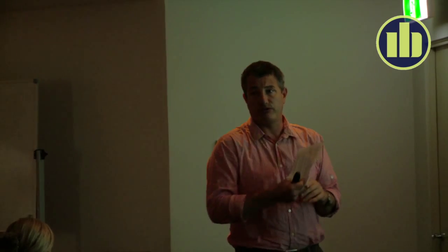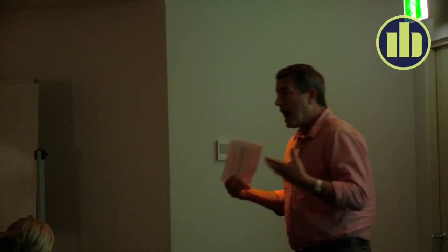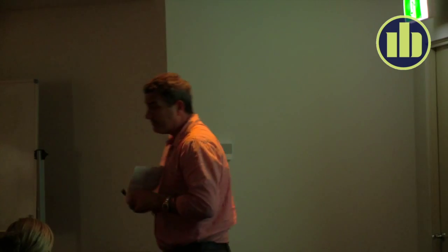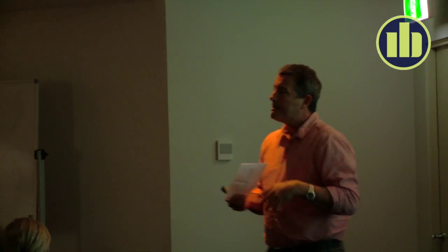The other thing is you can set up an estimating system that gets rerun constantly. So you end up with this notion of real-time feedback on what cost is doing as design changes. And there's big benefits that come out of that. So when I look at those two things alone, I think it starts to create better buildings because you have money targeted at the most important design features. So there's not money tucked away in some concept where people are not aware what something is going to cost.